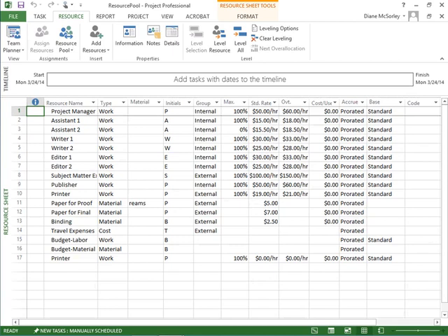So what a pool is, it's a Microsoft Project plan and it only has resources. Nothing else. No tasks, nothing. Just the resource sheet is completed, and when you save it and give it a name, give it a good meaningful name. Resource pool always works for me. And then I need to kind of declare it as the resource pool.